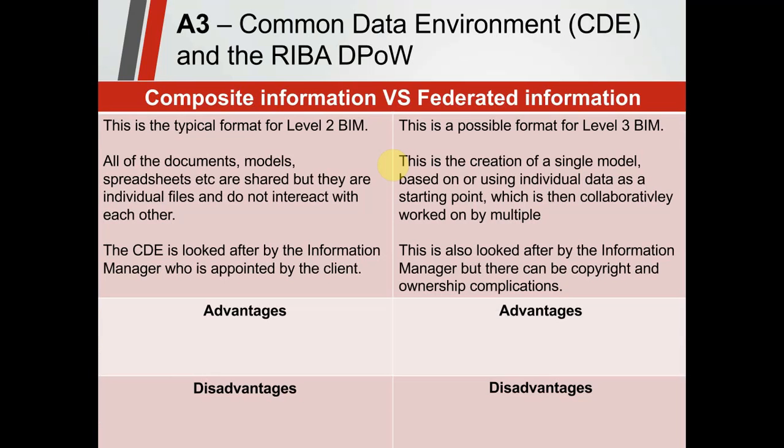That CDE level 2, the composite information, is looked after by the information manager who has been appointed by the client. All of the regulations, the BIM protocol, all that kind of thing that we've looked at, says that the client should be appointing an information manager to oversee that CDE between all the different groups.